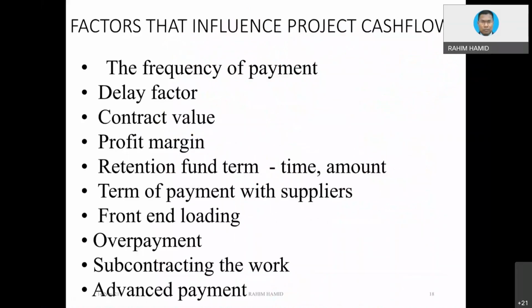Factors that influence project cash flow. First thing first is frequency of payment. How frequent is the payment from the client? If the client consistently pays in accordance with the SOP, if for instance every month, that would be fantastic.